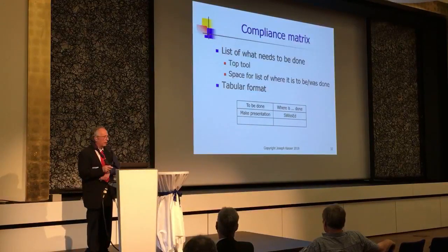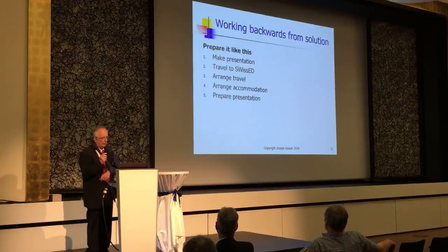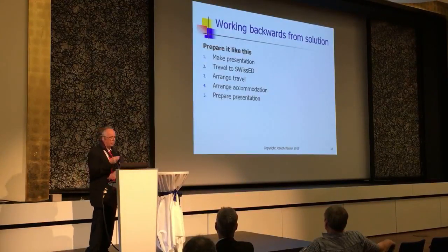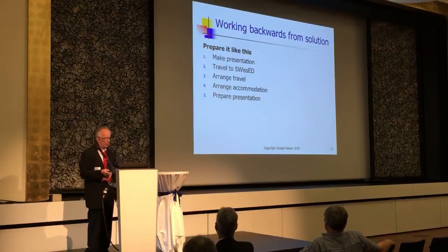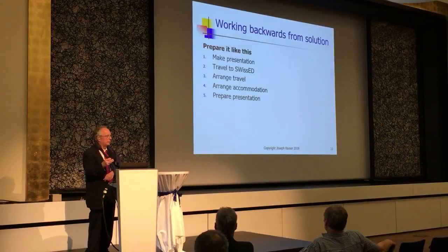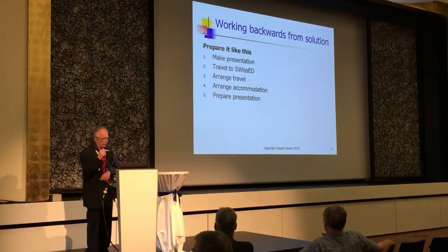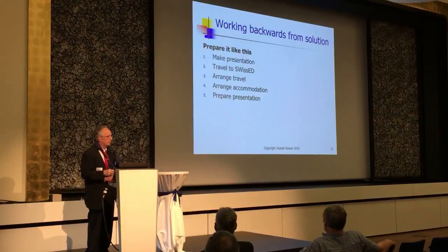The way you complete this is, instead of working forwards, you work back from the solution. So consider I'm standing up here today. You prepare it like this, make the presentation. Okay, what did I need to do to make the presentation? Well, I need to come here, travel. So I need to arrange travel. I need to arrange accommodation. And then I need to prepare the presentation.